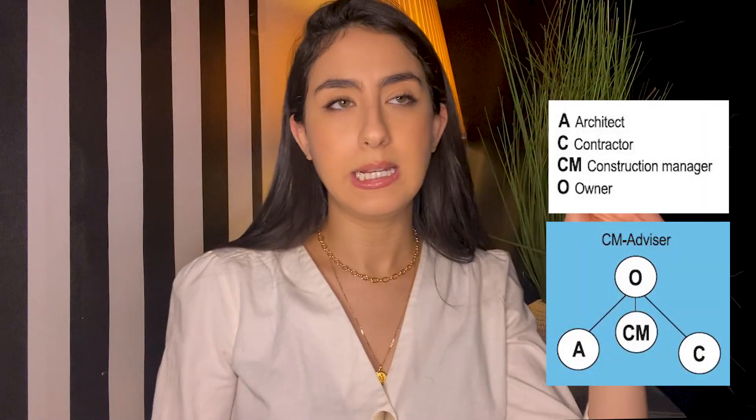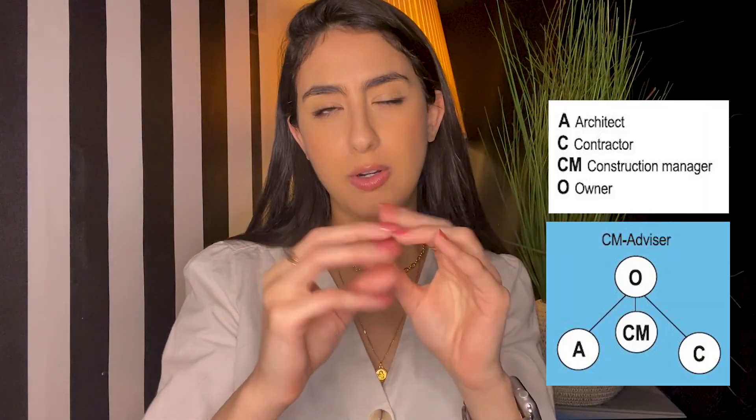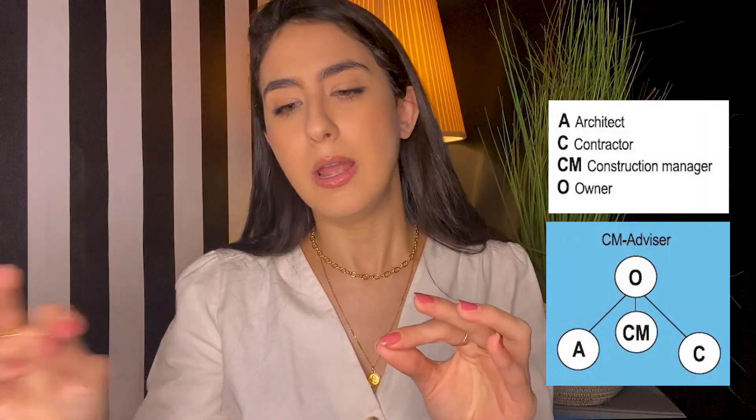Then there's construction manager as a delivery method. Usually the owner hires an architect, a construction manager, and a contractor, because the owner is too busy or it's a big company that doesn't want to deal with the day-to-day. So they hire someone to represent them — that's the construction manager — who will manage the project. And the last one is fast track.